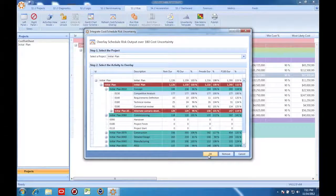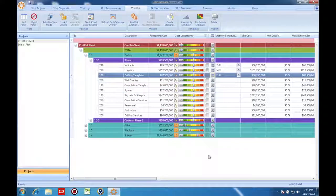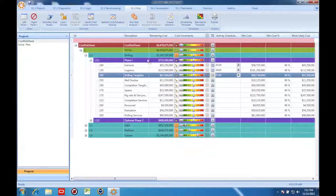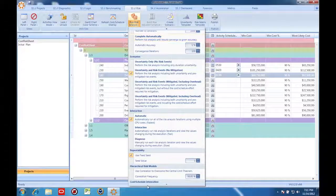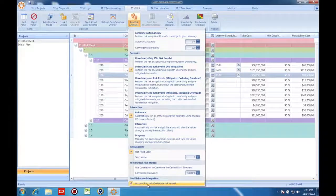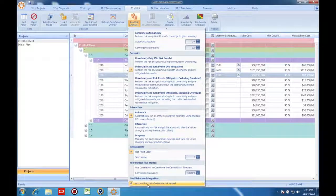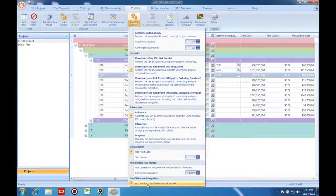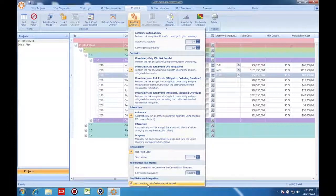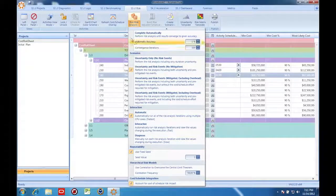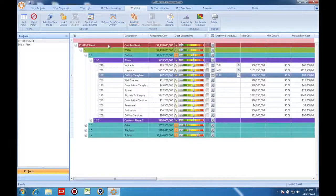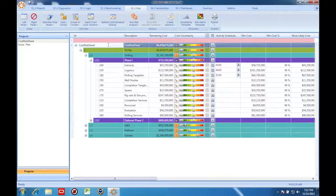Once I'm done with the mapping, I'm going to run another Monte Carlo simulation on the cost and I'm going to make sure that I have this option selected, which tells Acumen Risk to account for the cost of schedule risk impact.